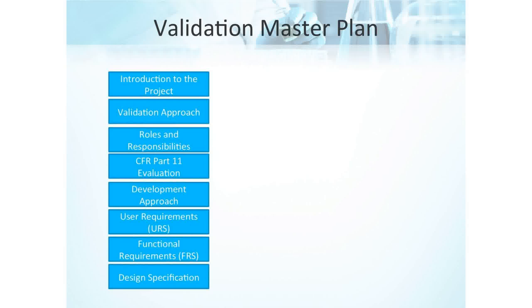Right. So said a different way, most companies should have a checklist, or some form of evaluation, that says, for this project, does it adhere to it? There's a bunch of questions that need to get answered by the system owner and by a couple of other key people that actually determine whether it falls under CFR 11. And that can be a combined document, because it could determine, does it also require Sarbanes-Oxley oversight or some other? What's the records retention policy?